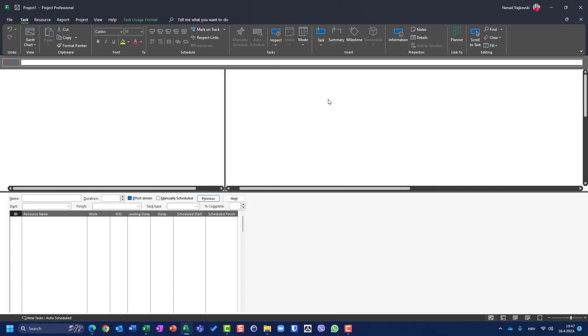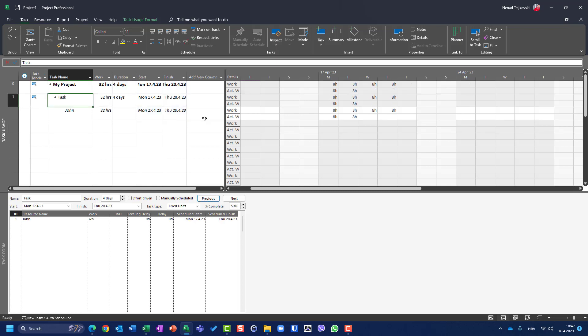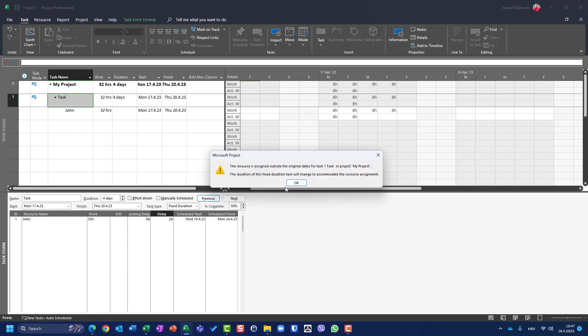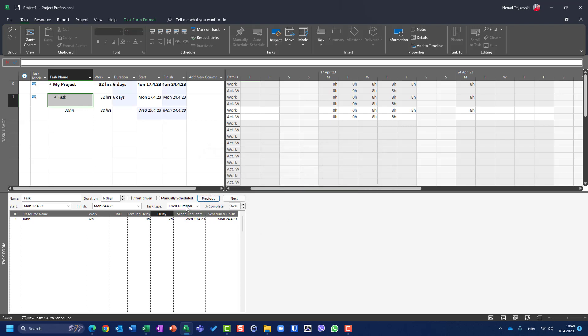Let's see what happens if I undo it and choose a fixed duration task. I say OK, and set delay to two days. I will get a warning message, because the delay must be accommodated to the resource assignment. Now this four-day fixed duration is not going to be respected anymore, because the task cannot be started as planned. The fixed duration is overwritten, so it is no longer four days but six days.